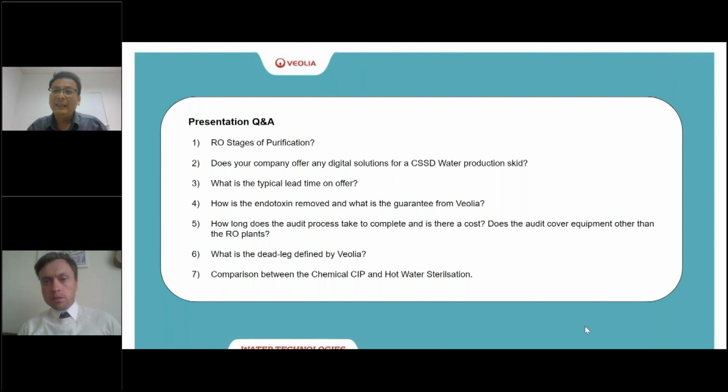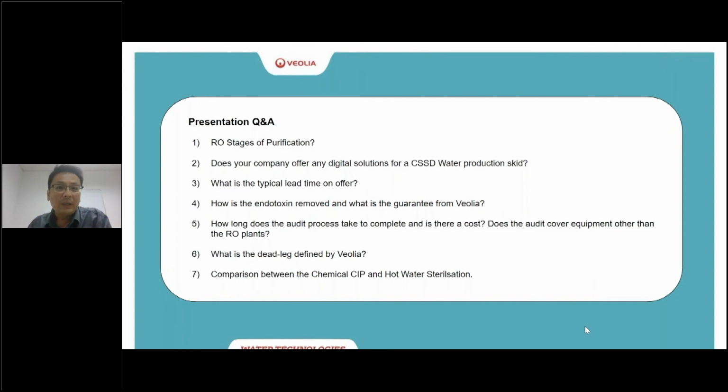Certification itself basically comes from the factory acceptance test and the site acceptance test of the system itself. Before the system is delivered to the customer site, we usually conduct a round of factory acceptance tests to make sure that the materials of construction in contact with the water, from a material or even a gasket perspective, have the certifications to the FDA requirements.